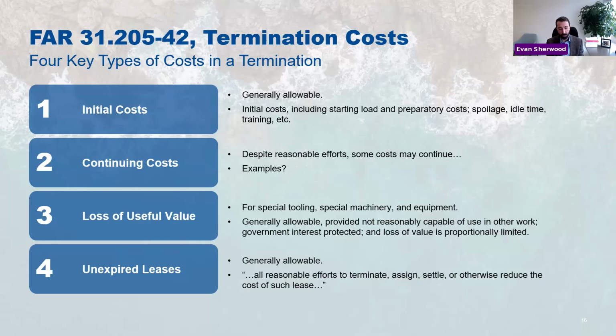Well, those could be your startup costs, right? You may have started work and planned and done significant investments in the first month, planning on a year's worth of revenue coming your way that was going to make up for that. But if the agreement is terminated 6 weeks in, you may not have had the revenue stream to account for that. Well, this cost principle gives you a basis to claim those costs as reasonable, saying, oh, look, these are initial startup costs that we needed to do to be ready to do the work.